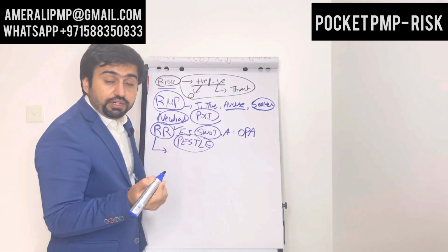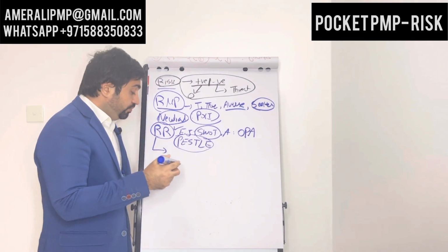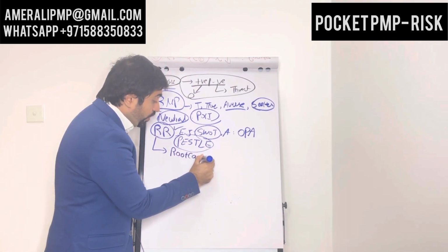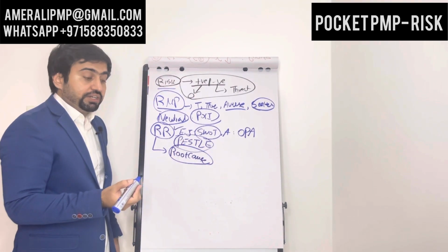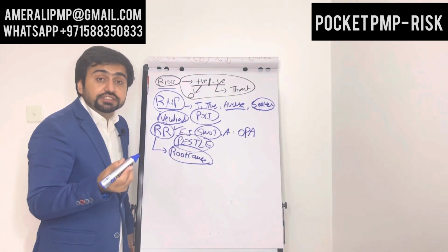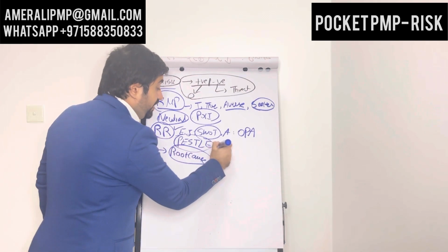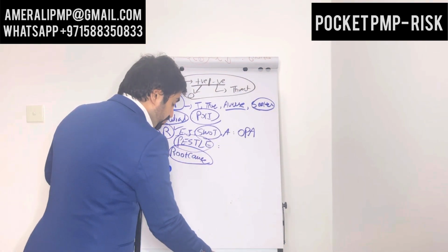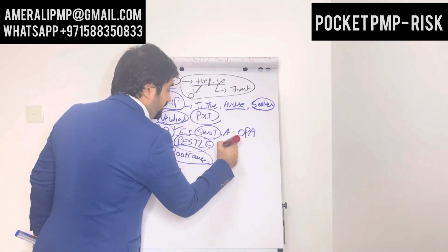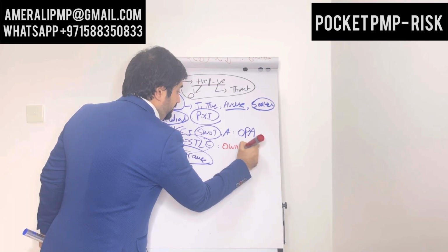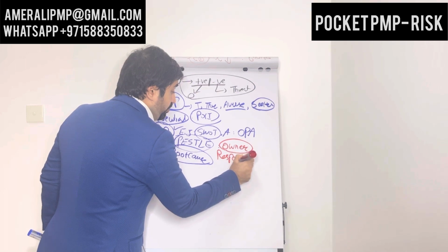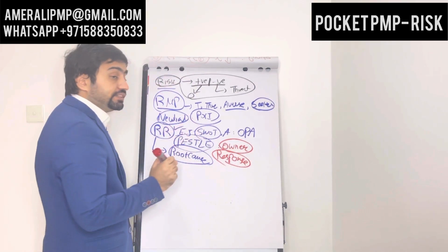Once you put all the risks into the risk register, you also want to record the root cause: why are these risks going to occur, the reason behind that particular risk. You also want to put in the potential owner who is going to handle each risk, and the potential responses for these risks. Put these things into the risk register as well.